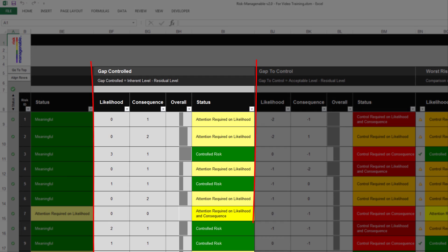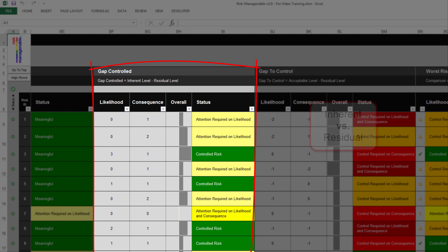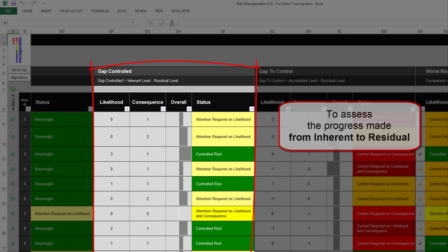The section Gap Controlled is automatically calculated and color-coded based on the settings in the Risk Parameters tab. This section compares Inherent Risk Levels and Residual Risk Levels, displaying explicit information on the gap which may or may not have been addressed for the likelihood and consequence of the risk. This feature will save you a huge amount of time when assessing the progress made with the treatment or control currently being applied.